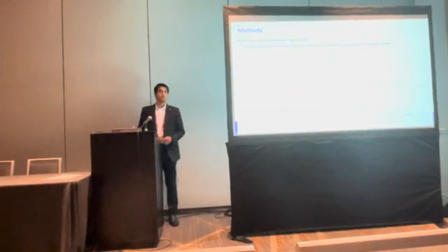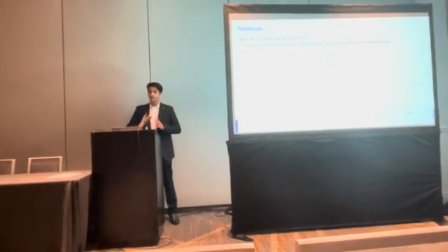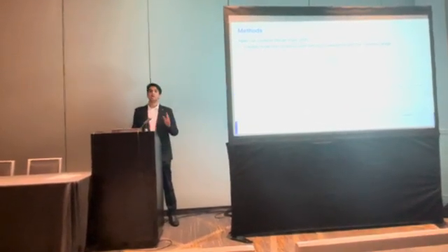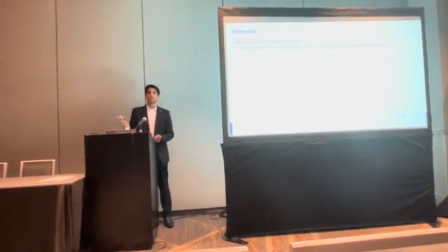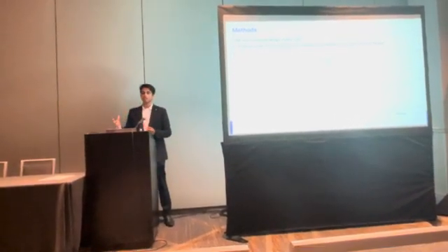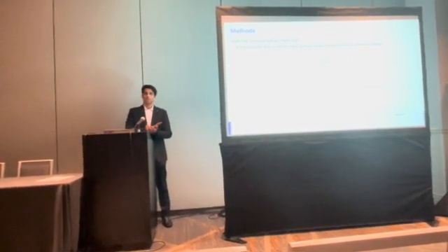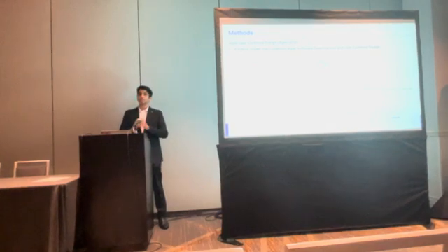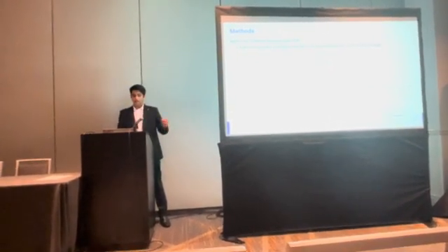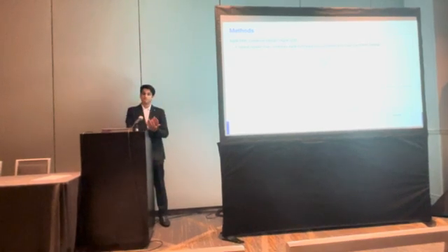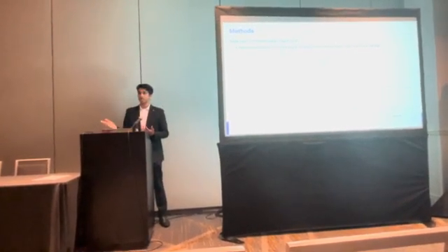And here, we combine Agile software development principles and user-centered design in order to create a hybrid model called Agile user-centered design approach. So user-centered design is normally very time-consuming, and hence, in order to combine that with Agile software development principles, what we did was we took a big part of need assessment from user-centered design and put that as sprint 0 and also the beginning of each sprint or phase.